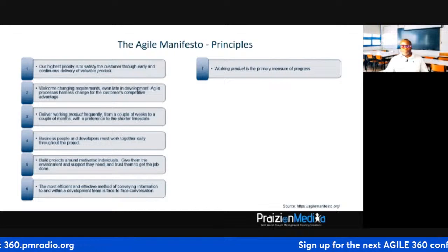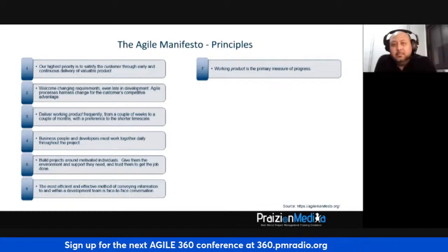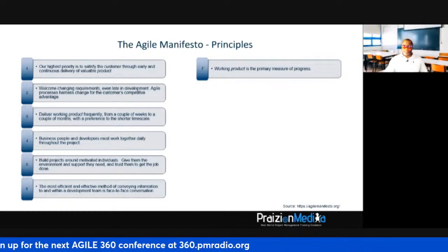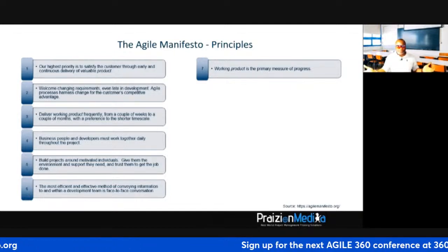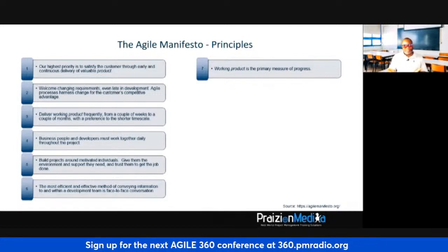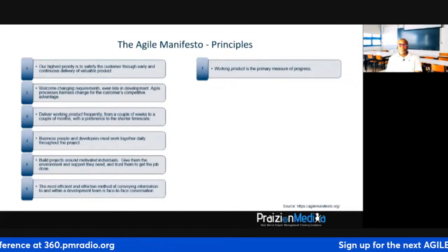So in the world of Agile, we don't do that. The reason why we don't do that is this. If you're doing things in 2-week sprints or even 3 weeks or 4-week sprints or iterations, same thing, we already know that at the end of 4 weeks, you're done. So what is the point of doing percent completes? It's only a waste of time and a distraction.